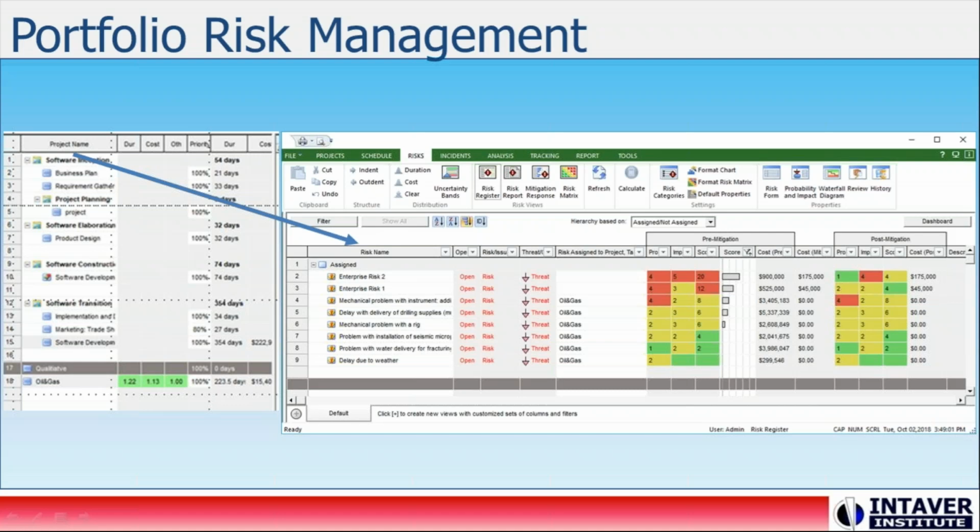So we've decided at the project and program level we're looking at it very quantitatively because we can roll those up. At the enterprise level, you can see we've changed how those are scored. We've gone to a more common qualitative view of assessing the risk. The actual underlying data is the same, but we have algorithms that will convert qualitative to quantitative to qualitative analysis, and it gives us a score.